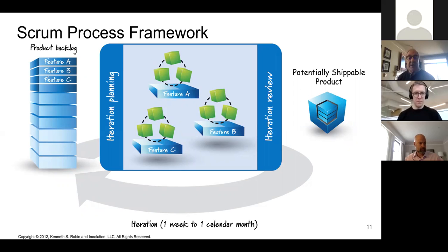At the end, when it's done, we review what happened during the sprint. A couple of different things happen during that review. One is that we present something called a potentially shippable product, or sometimes a potentially shippable product increment. That is new working software that has the new things in it that the team has completed during the last 2 weeks. And like we always do in an agile environment, we said we wanted to create something that was observable, inspectable at the end of every iteration. And so that's what we have. We have working, tested and integrated software, actually.